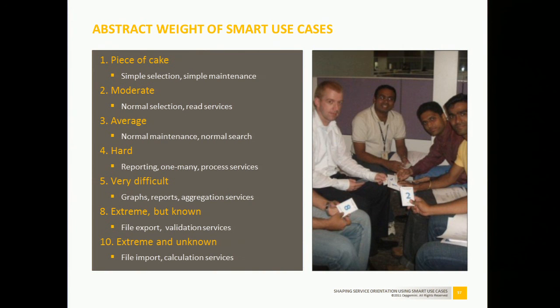And we said, okay, 1 to 5 is good. But I've seen different ranges for different kinds of stuff anyway. There are also people using Fibonacci numbers, and people that do 1, 2, 4, 8, 16, or 1, 2, 3, 4, 5, 8, 13, 20, and 100. I've seen that too. So there are different ranges. But this is the range we've been using for about 10 years now.